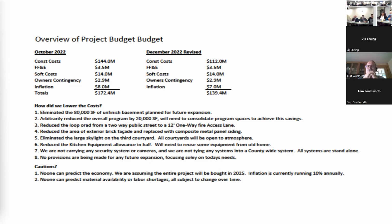But it would seem to me the site work would be critical, so we know what we're facing. When we did the jail, it came back to bite us because we didn't do good site work when we found the ground was contaminated with gasoline. And that was another 300 grand, which was a lot of money 20-something years ago.